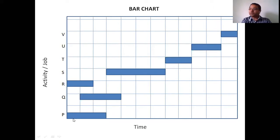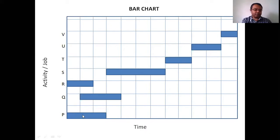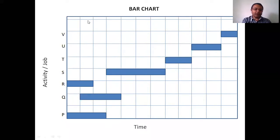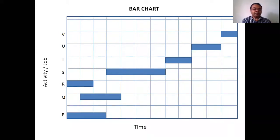Dependency means: suppose you are constructing an apartment. First you have to construct the first level, then after that you go for the second story. For construction of the second story, it is important that you complete the total construction of the first story first. That is called a dependent activity. So in the bar chart, the main disadvantage is that we can't predict the sequence as well as the dependencies of different activities.